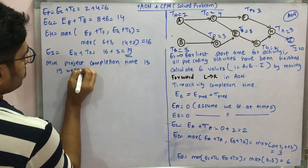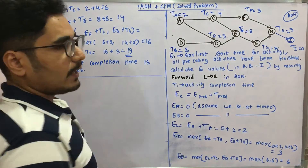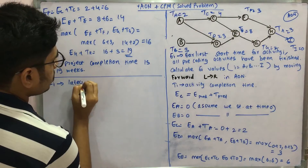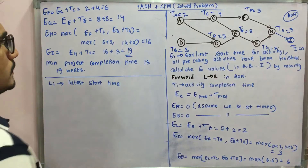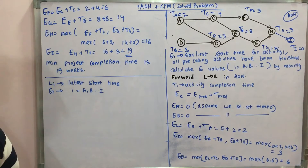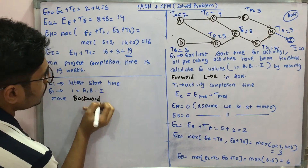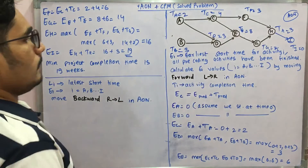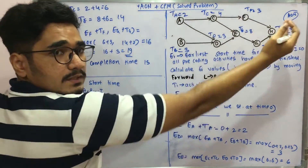After phase one, we move to phase two: calculating the latest start times, represented by LI. LI represents the latest start time for any activity. To calculate LI values for all activities A to I, you traverse the AON diagram in a backward direction — from right to left.